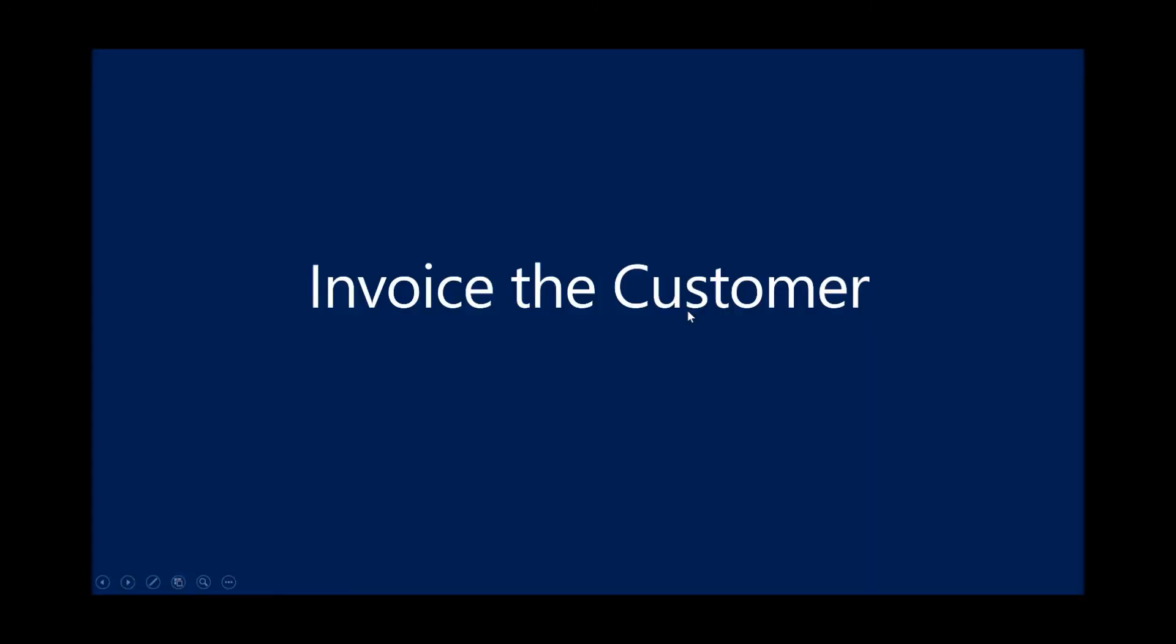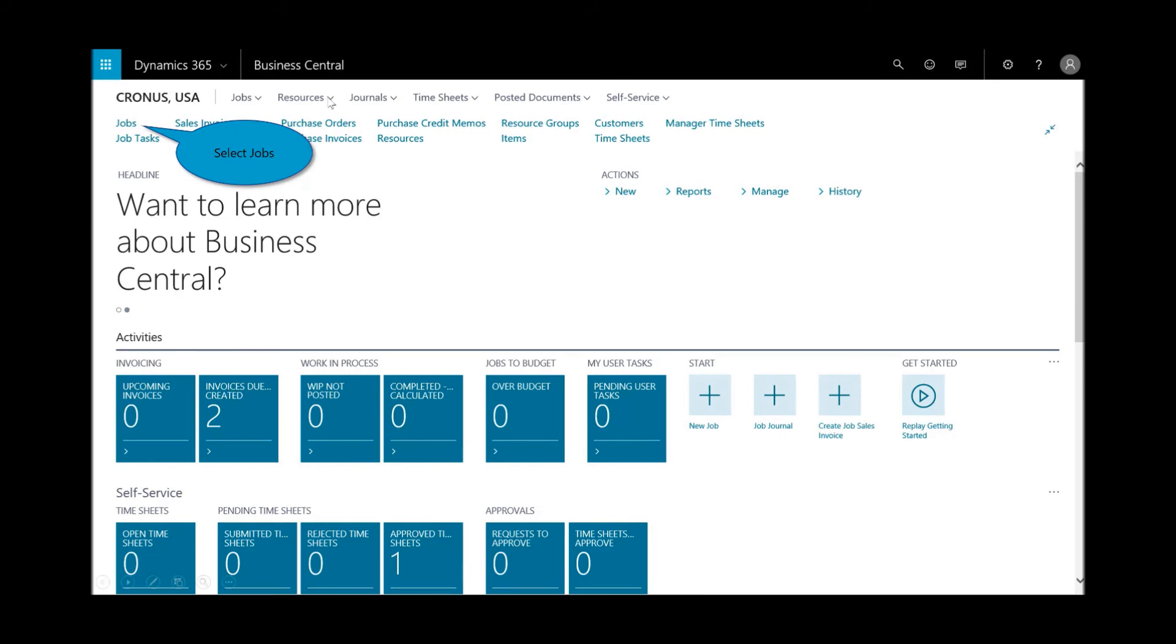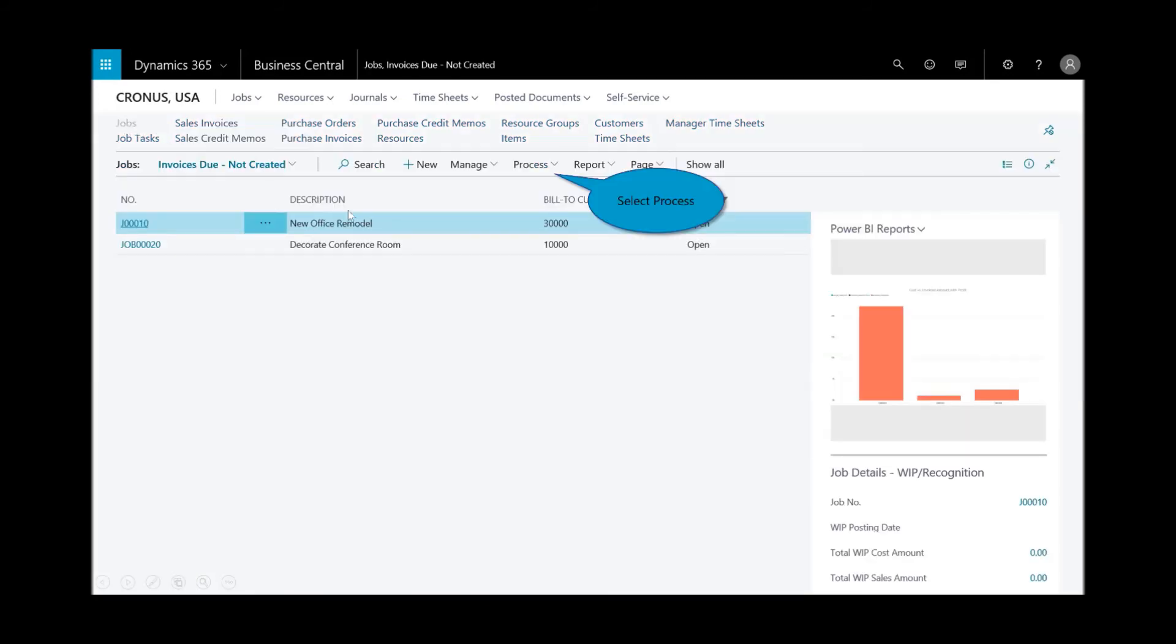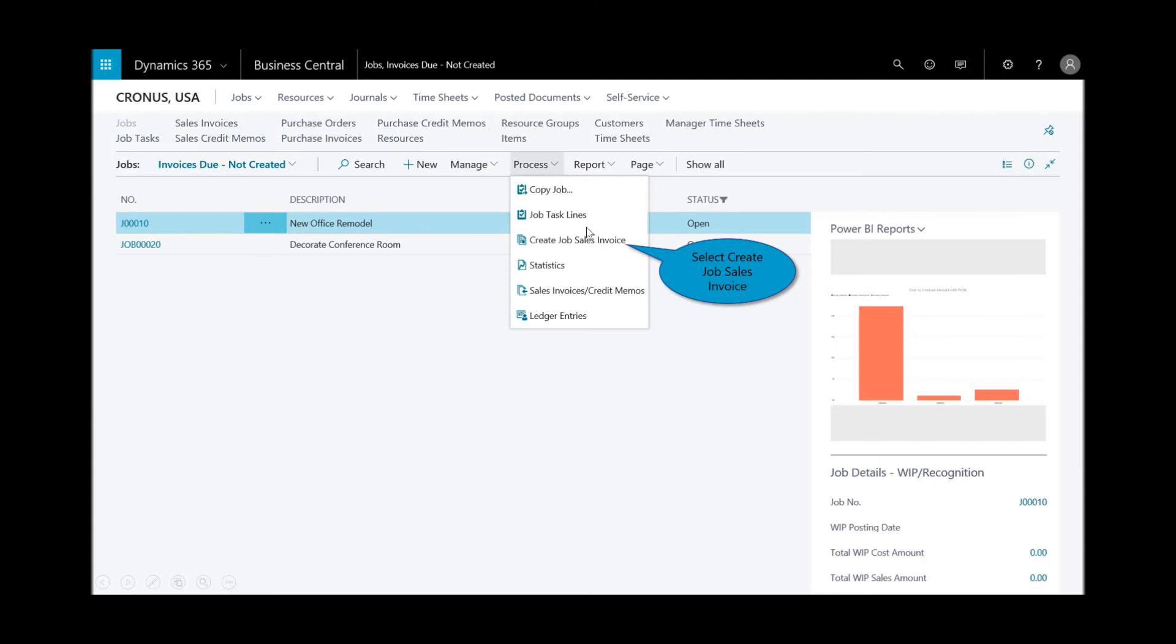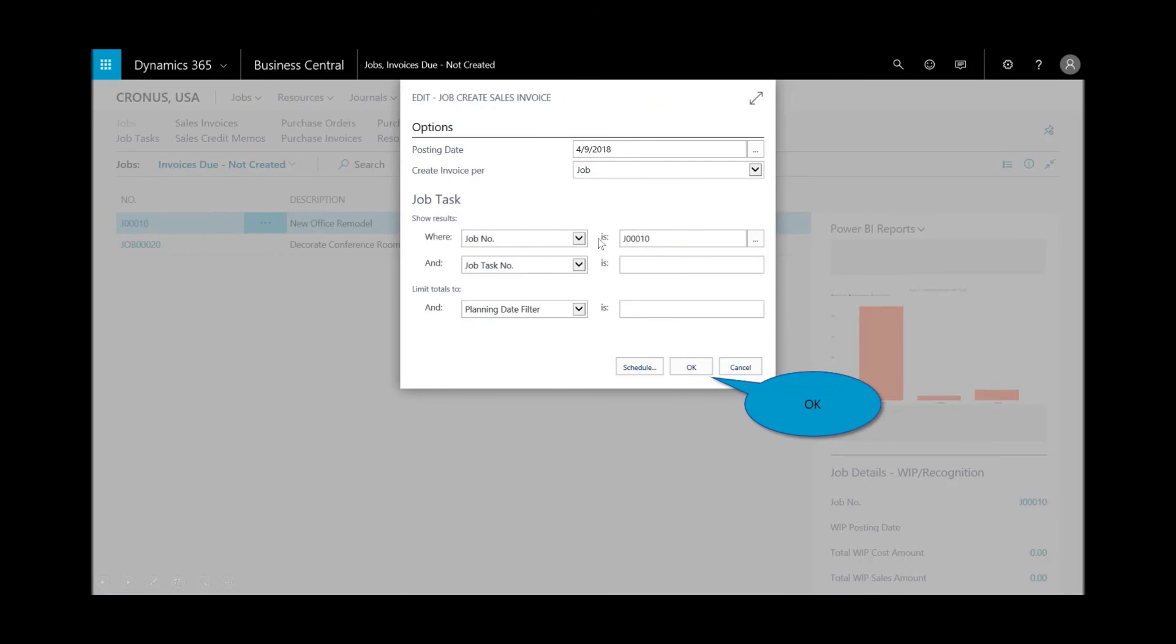Then I'll need to invoice the customer. I can create an invoice for a job for one or more job tasks, depending on where I am with the invoicing process and based on the date of the invoicing and the invoicing schedule. I can also create an invoice from a job planning line and indicate all the time and the quantity of the time, resources, and the general ledger accounts that I want to invoice. I'll select jobs. Here's that new office remodel, and I'll select process. I want to go and create the invoice for one or more tasks. Click on OK.